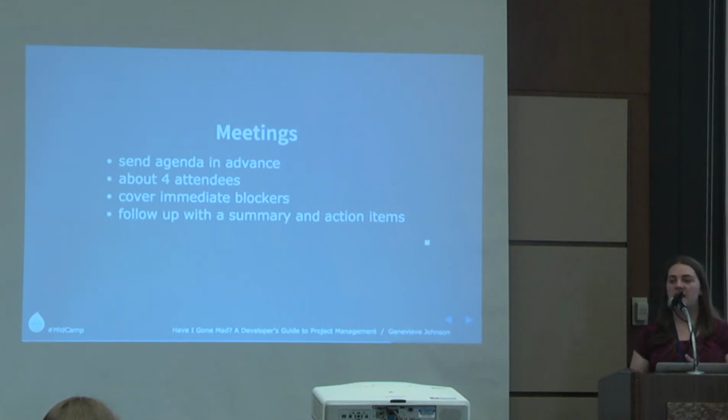I can't tell you how many times I've sat in a meeting with a client and they tell me they want something, and I go, yeah, that's really cool. Okay, I think we're on exactly the same page. We've spent the last half hour talking about this, and we leave. I build this out, I send it to them for review, and all of a sudden the client says, no, wait, that is not at all what I wanted you to do. That wasn't at all what I was expecting. And I'm thinking, were we not just in the same meeting together where you told me that this is what you wanted? So be sure to send that summary so that if something does seem wrong to them, or even to someone else on the team, they can come back right away before anything really gets done and raise those questions.